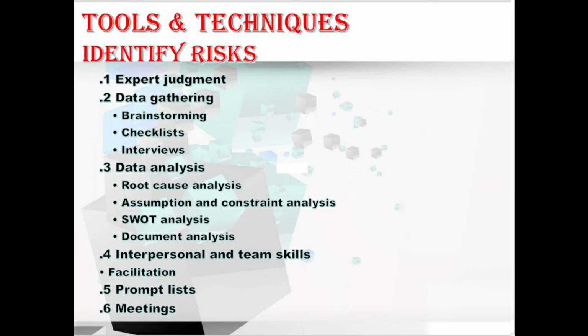Moving to the document analysis. In this, risk may be identified from a structured review of project documents, including the plans, assumptions, constraints, previous project files or contracts or agreements, and some with technical documentation. Hope you understood this technique of identify risk.